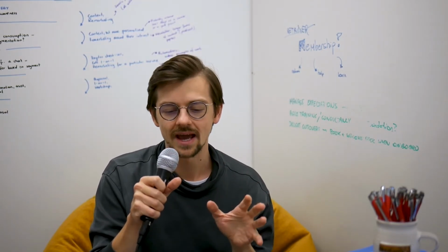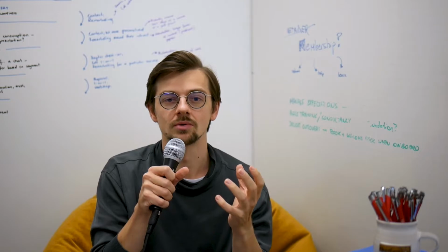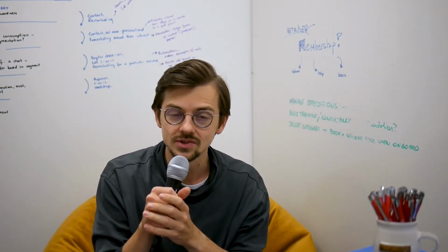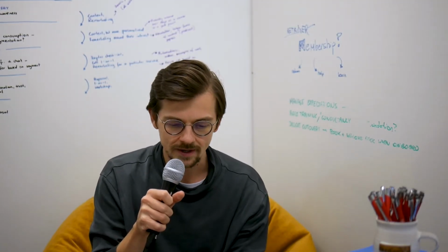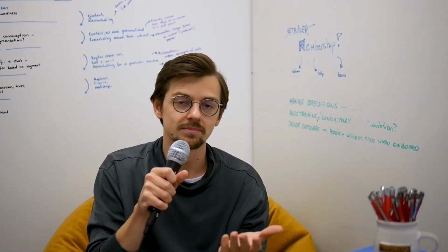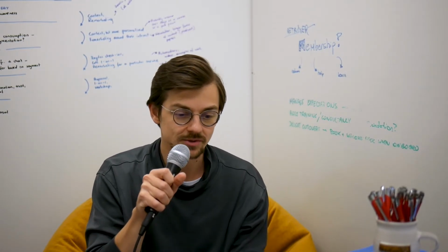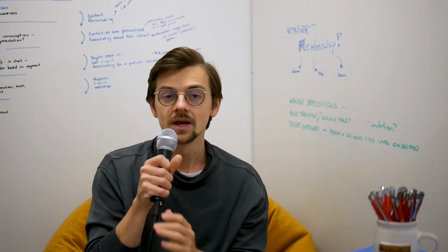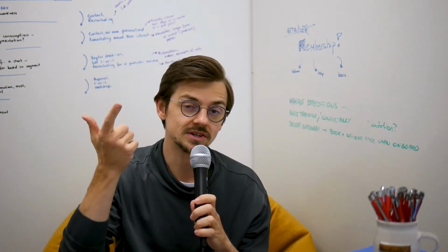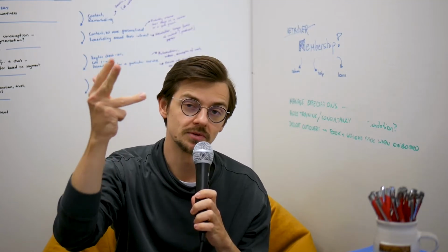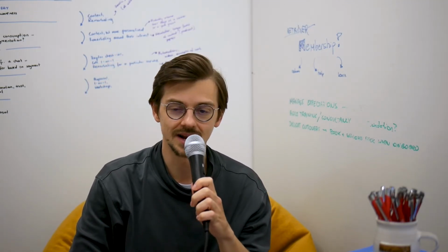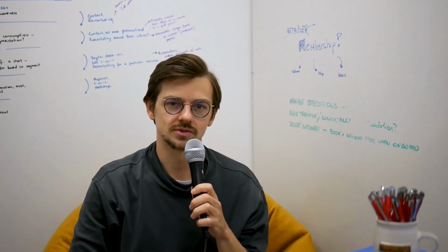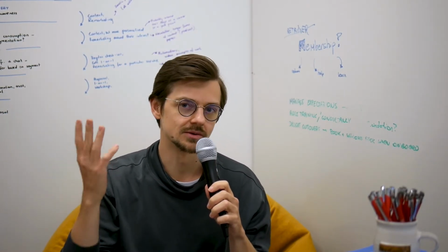A designer and developer can't build a product on their own. You need extra people. And usually there are also quality testers, product owners, or copywriters, right? You can't build a website without copy, and you need to test things. And you also need someone to communicate with the client, the product owner. So usually 5 people: designer, developer, quality tester, copywriter, and product owner who communicates with the client. There can be more.